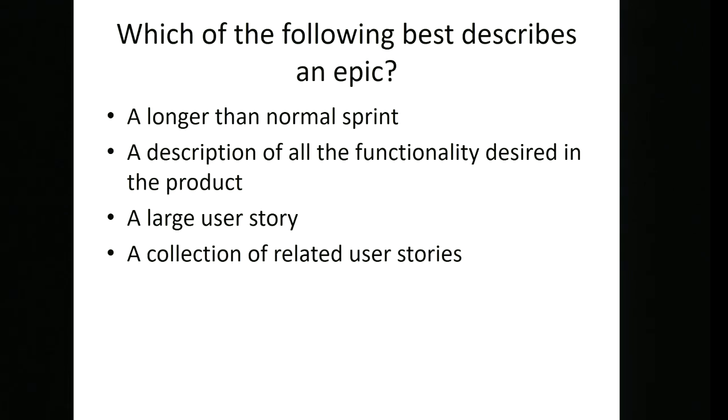It's one that you're probably not going to try to tackle by itself, but it's still an encapsulated item of functionality, which we might want to break down later on. So again, this is slightly nuanced. Although it may end up being broken down into other user stories, when you describe it as an epic, it is a single user story, and you're using that as a technique for still describing a particular piece of functionality.